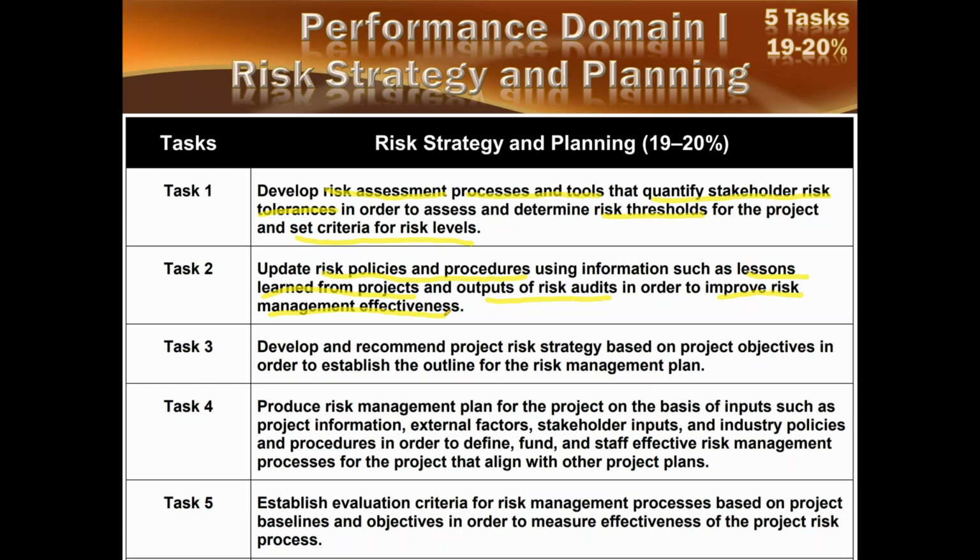And then how do you use the lessons learned from old projects? It means the previous projects, the risk registers and the risk mitigation strategies and actions you have taken in the previous projects. That might also be used in amending the policies and procedures for the future. And also, we might be using the outputs of the risk audits, the risk audits we have conducted earlier on the earlier projects.